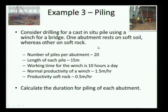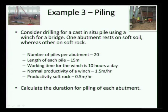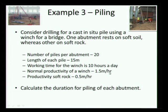This is yet another factor which can change your production and productivity. The number of piles for the abutment is 20, and the length of each pile is 15 meters. The working time uses a winch-operated system where you pull the winch, drop the hammer, grab out soil, and then start pouring your pile. Normal productivity of a winch is 1.5 meters per hour in soft soil. Productivity in soft rock is different — you can assume that 1.5 meters per hour is the productivity in soft soil.